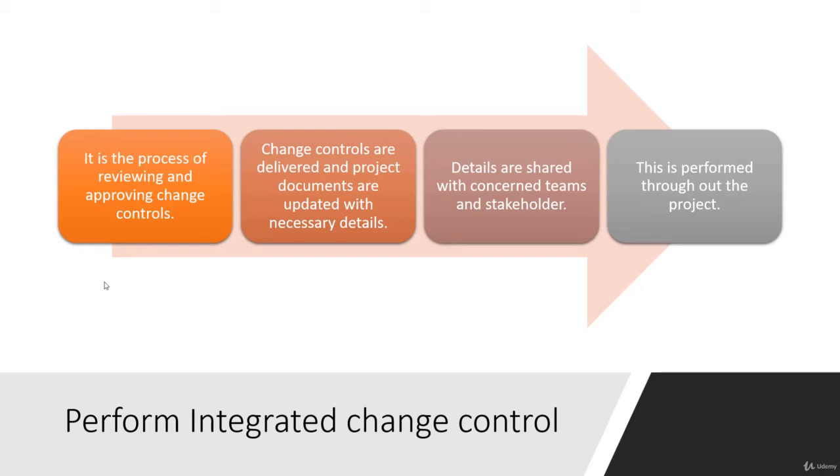Now most organizations already have some kind of processes. Let's say if you receive a change where the overall effort is less than 40 hours, which is less than a week, in that case a lot of companies directly accept and approve them and start working on them. But if it is going to take more than a week, then it will go through a different channel where it will go through funding and release management, where its delivery will be planned separately. So all of that is change control process.